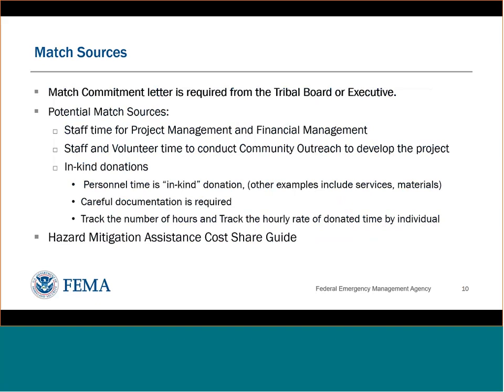We were just talking about cost shares, and sometimes we'll use the term cost share, sometimes we'll use the term match. We use both interchangeably. A match commitment letter is required from the tribal board or executive, and this letter should identify where funds for the local cost share would come from.